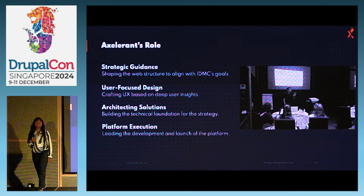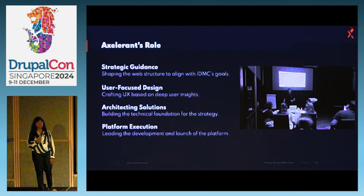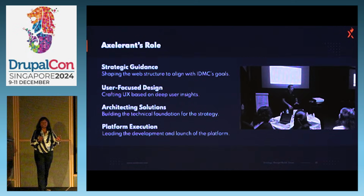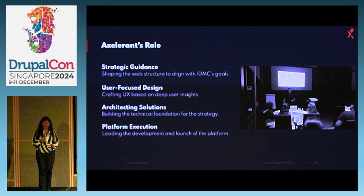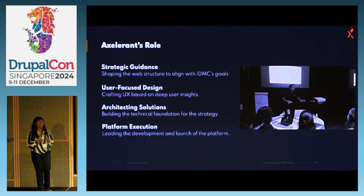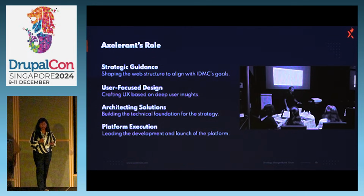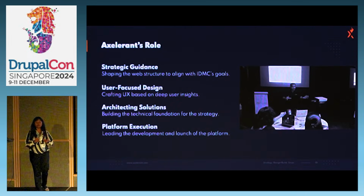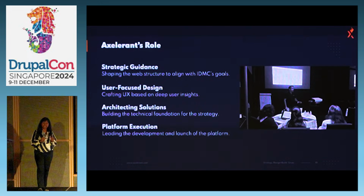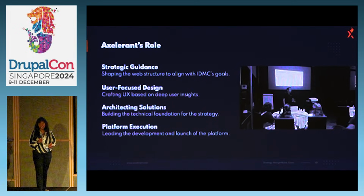So my part as a business analyst comes into the picture. We went through different types of discoveries, calls, and workshops with the client. The client said, I need everything within 3 months. So we drilled the different things down into smaller tasks and prioritized them in different workshops. The first one we put was search. We told them, let's ensure that search is done within the site search and not from Google. That is the very important thing we have to do first.